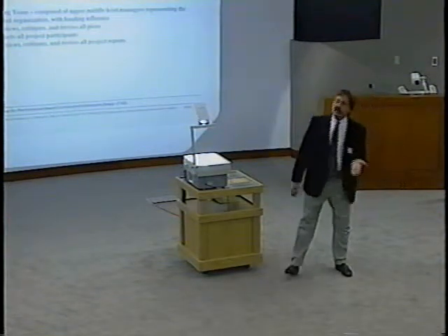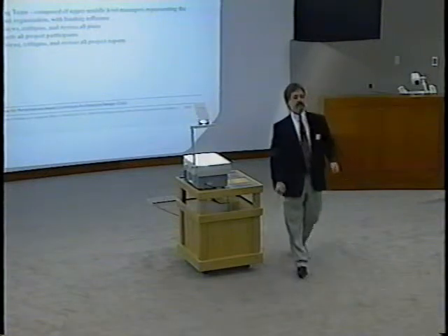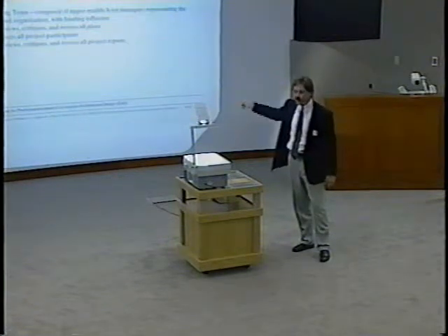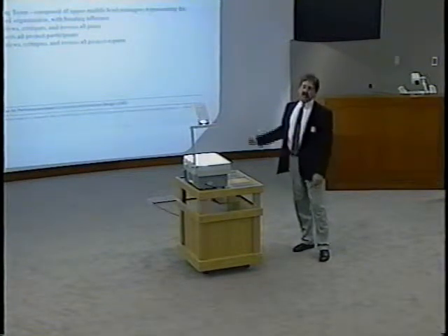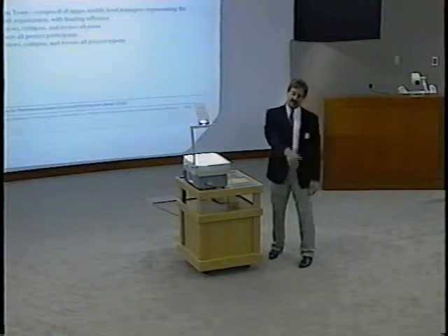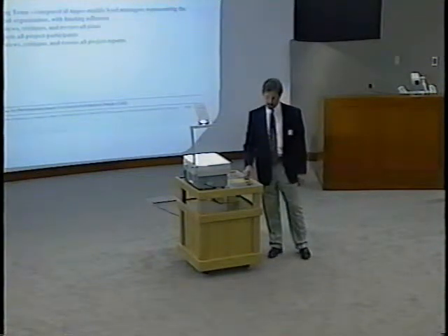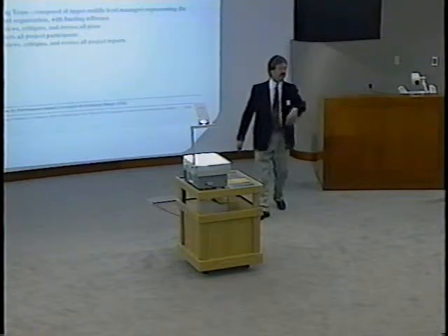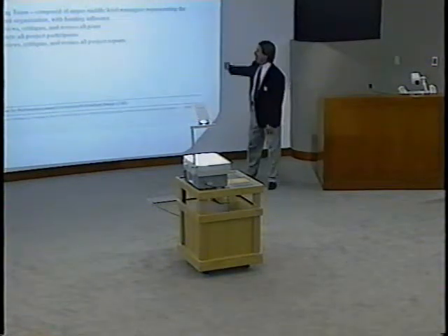What's a stakeholder? Somebody who's going to come out of the woodwork 6 months from now and stop you cold. Find out who they are now and engage them on the front end of this process, and run the gauntlet with them 3-4 times if you have to, but get it all out now. So you'll reduce your cycle time and your cost for rework, because they'll force you to do rework. You're recognizing some of what I'm talking about, huh?